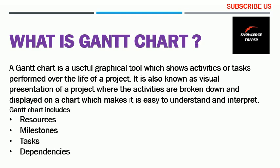A Gantt chart includes resources, milestones, tasks to be performed, and dependencies. Regarding resources: using a Gantt chart, you know that at a specific point in time you will require wooden shuttering for rooftop construction, so you order it in advance — before you actually need it — to make it available on the required date so your other work is not affected. Regarding milestones: at different points in time you can assess that 30% or 50% of your work has been completed.